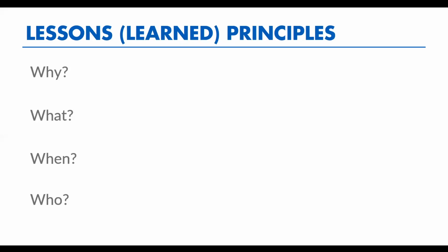So of course, if you do them right at the end of the project, it means you're not going to be able to use some of your learning to course correct because you finished the project. While if you do it throughout the project, you are able to use that learning to make changes in your interventions. I would just add that absolutely, I think the correct time to do it is at the end of a project or post-project.